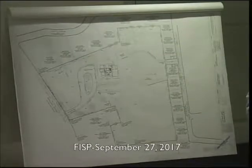Yeah, and if I can interrupt, to my point, responding back to Bill, we've seen the floor plans and the elevations going through a couple of refinements and iterations. You've really only seen this particular site plan once, and it was kind of quick. So my thought was, before we go running off to the planning board, let's all buy in that we're okay with this. If for some reason you wanted the building oriented facing a different way, or you didn't like the parking, if there are any major changes, let's go through those now, rather than having the planning board and utility companies thinking one thing and next month changing.